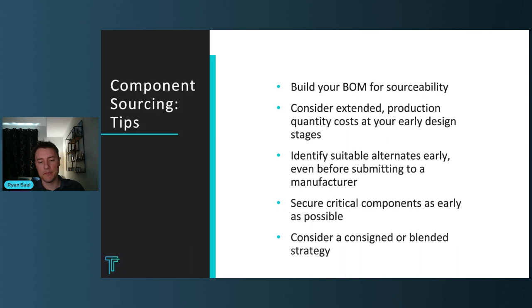So what these brokers are doing is they're buying parts, speculating that they're maybe going obsolete. Maybe they know this, or maybe they've seen an uptick in criticality of these parts. They're buying up all the supply and then selling them out at 10 times the price. This is a well-known, very profitable racket. You don't want to be involved in it if you possibly can avoid it. So secure your parts early. And if your parts can only be secured through the gray market, I would highly consider designing them out if you can.